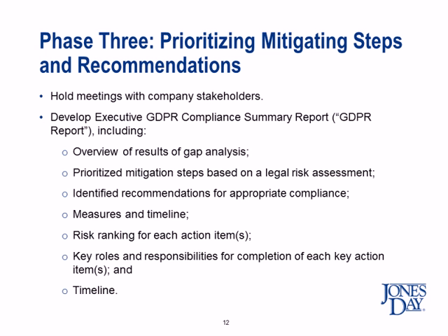Think about some risk ranking if you can do it for certain action items that you may have in mind, and then also include in the report for management if possible the key roles, and if you can do so, the responsibilities for the different people that you may have in the team assigned to work on a GDPR compliance project.